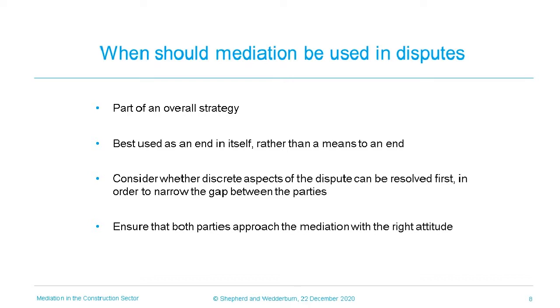In a similar vein, court proceedings should be useful to make the parties articulate their entire position and provide documents and vouching to support that position. This could help both parties to better understand the other party's position, which will help to evaluate the possible successes and outcomes of the dispute.